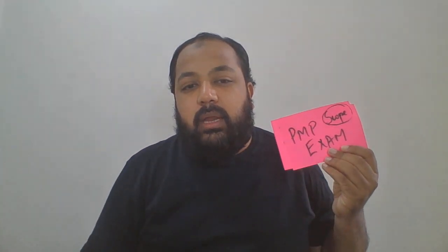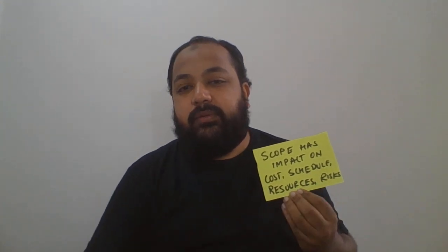Okay, when you come to your project scope and your charter, the charter has a scope that's high level. Towards the end of the video, I'll talk about the topics that are covered in scope for the PMP examination. Okay, so understand the subtle differences. Charter has high level information on the scope. Your defined scope will give a project scope statement that will have detailed requirements. The keyword is detailed. Okay, then very, very important as a project manager, and even your team should understand this. Scope has a very big impact on the cost, the schedule, the resources, and the risk of the project.